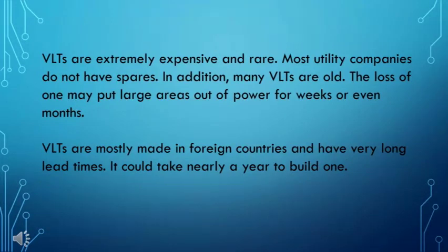VLTs are extremely expensive and rare. Most utility companies do not have spares. In addition, many VLTs are old. The loss of one may put large areas out of power for weeks or even months. VLTs are mostly made in foreign countries and have very long lead times. It could take nearly a year to build one.